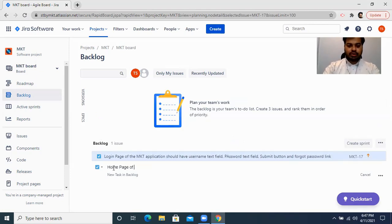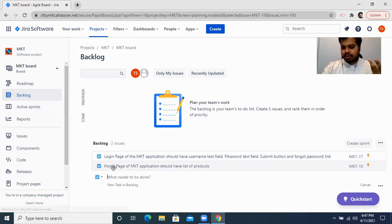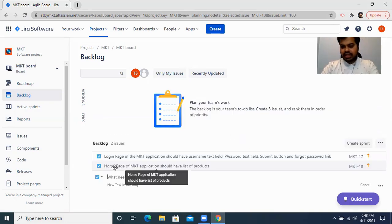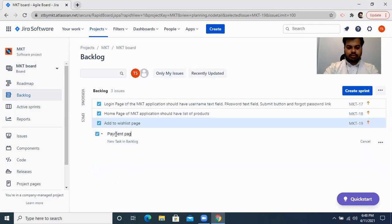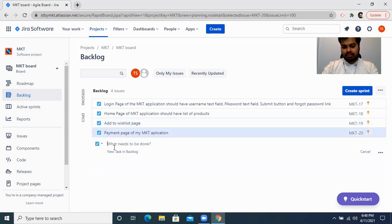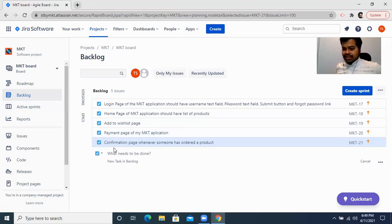That is my first backlog item. Now the second task will be: the home page of the MKT application should have a list of products that we are trying to sell. The third task will be the add-to-list page. The fourth task will be the payment page of the application. And the fifth will be the confirmation page — whenever someone has ordered a product. So this is how your product backlog looks like when you create items with just one click.